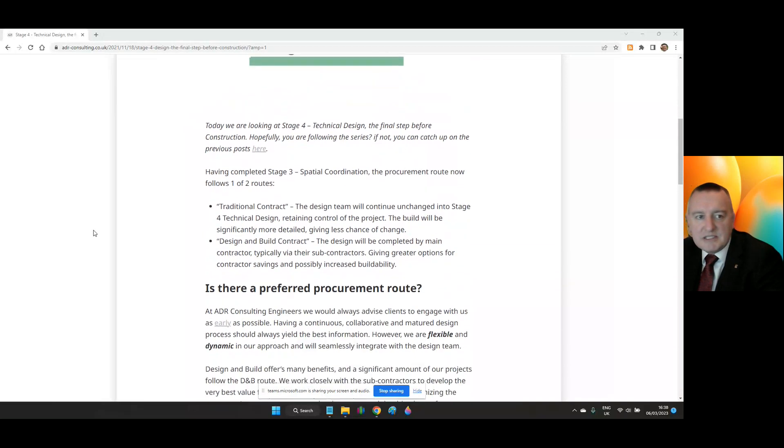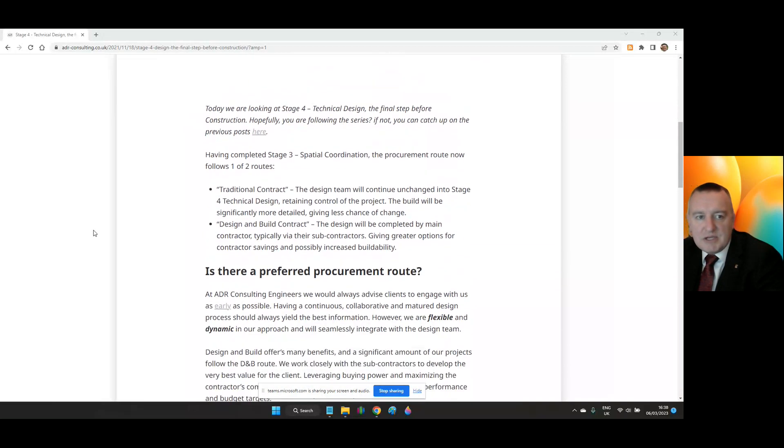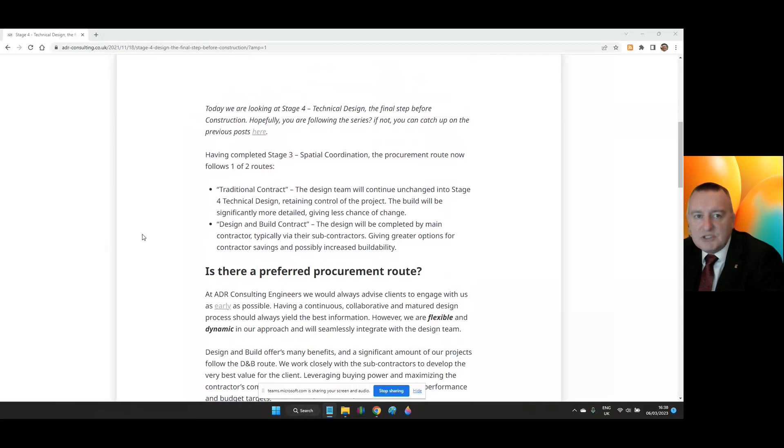Having completed Stage 3, Spatial Coordination, the procurement route now follows one of two routes. Firstly, Traditional Contract. The design team will continue unchanged into Stage 4, Technical Design, retaining control of the project. The build will be significantly more detailed, giving less chance of change.